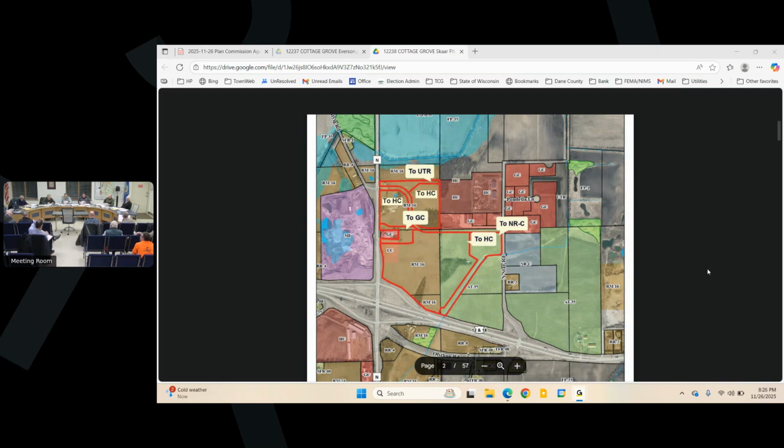And the county wanted us to put a site plan together showing the backup plan, because of the mass grading here, everything would need to be a mound system. We wouldn't be using virgin soils, or we can't predict where the grade is gonna be, so anything that would get constructed on the lots, should that system fail, would end up being a mound system. And they'll have plenty of rock in the area with their mass blasting to accommodate the extra cost associated with mound systems, so there's space for it on each lot and in those general locations as we show them.